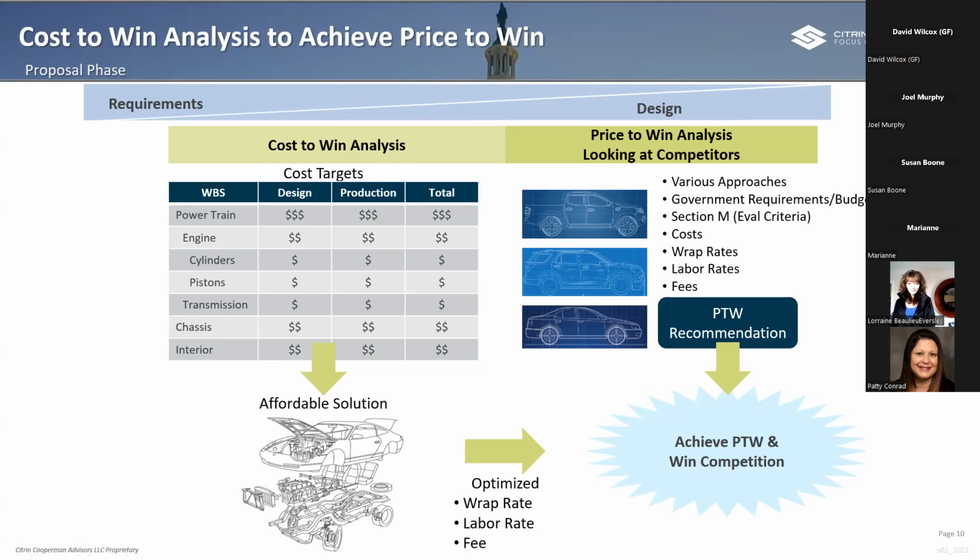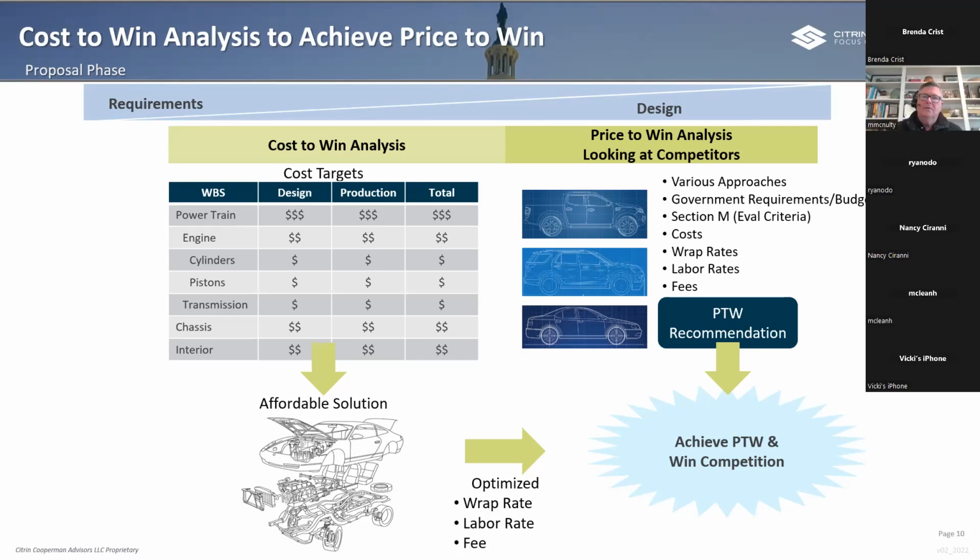Now, the price to win analysis is sometimes done internally, and sometimes it's done externally. We do, obviously, external price to win analysis. But if you work with any of the big outfits, they all have internal price to win teams, and they should. We work with them a lot. But the point is, all good price to win analysis is focused on the competition and their solution and their likely technical scores and their color scores and their likely price. And then that's going to come in and have to be dealt with by the capture team, the proposal team, to get them home. And so when these things are too far out of bed, you've got trouble.